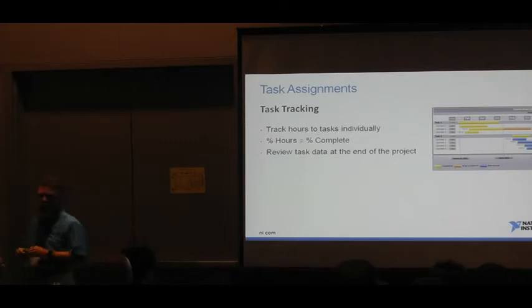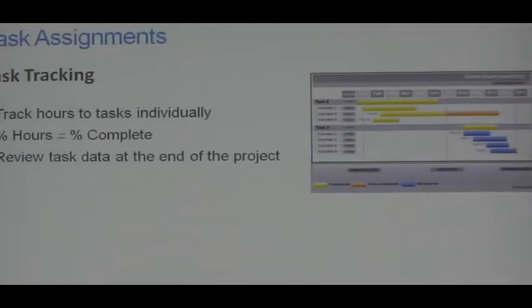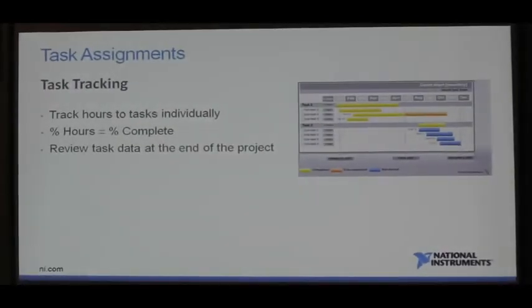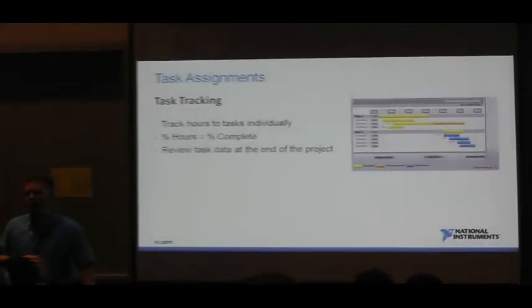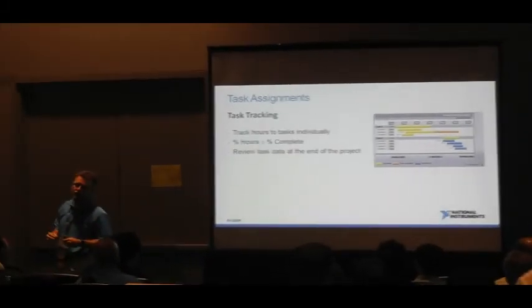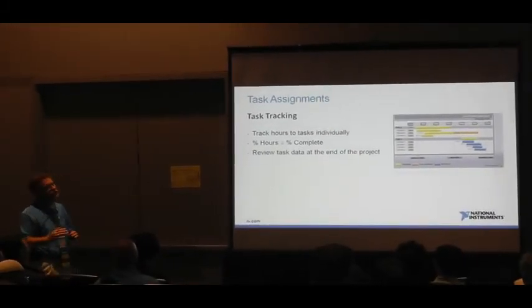So, talking about tasks, I think it's very important to track to the task. As Paul's mentioned before, you break these things down, you look at them, you make sure you have an estimate for these, but you really need to track to those tasks individually. So if you think it's going to take 20 hours to write this driver to communicate with this piece of hardware, track to that task.